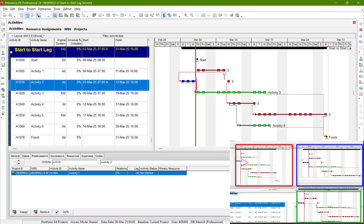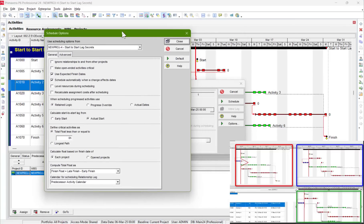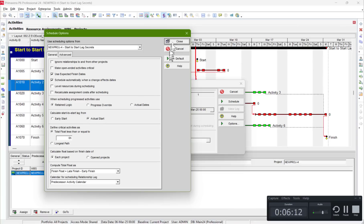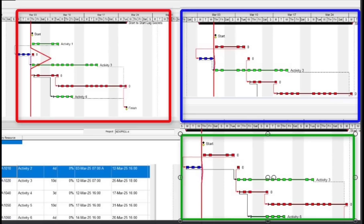If this is a true start-to-start and it's not linked to the other activity, then we can start it. But if it should wait until that activity finishes and there's no explicit finish-to-start relationship, that would be wrong. If it can truly start independently, we should allow it. So this is how we deal with start-to-start lags: use Actual Start with Retain Logic. Using Progress Override affects everything, but with Actual Start the impact is only on the start-to-start relationship while everything else stays the same — this one is still waiting for that one, which is normal.